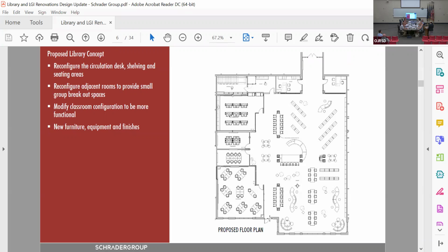We upload our drawings to a company, and they're the ones that electronically, thank God, we don't have to print everything all the time now. We'll send it out to contractors, and we'll maintain a list. It's probably going to be 3 primes. The plumbing is 1 sink, so that'll probably be a combined mechanical plumbing bid, but we'll have GC, electrical, and mechanical fire protection bid.